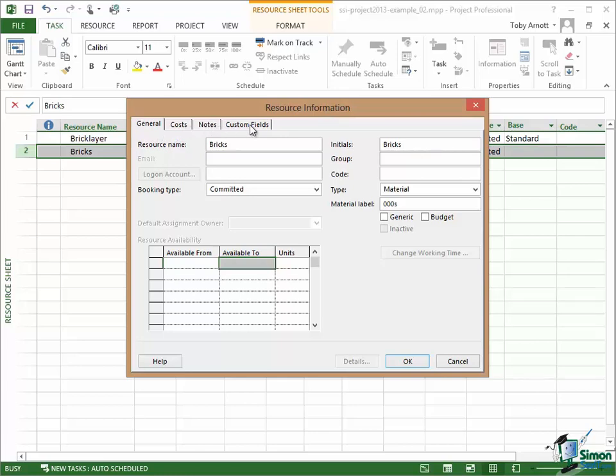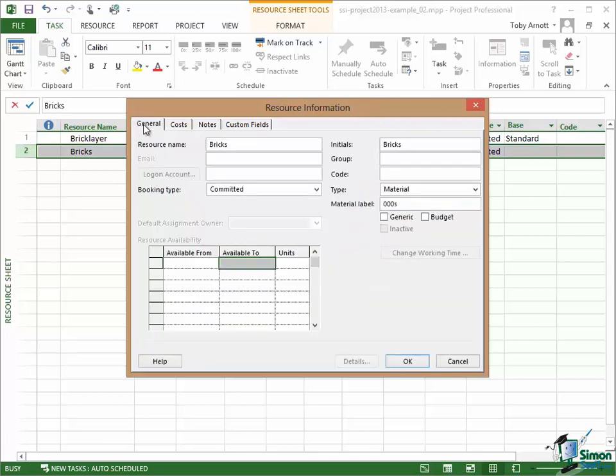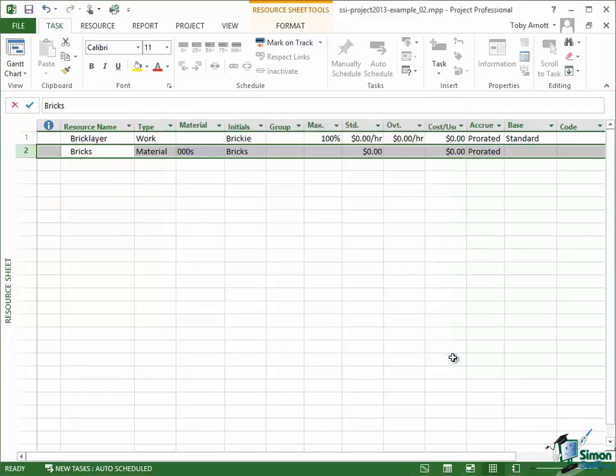We'll look at many of these later on in the course. One of the things to note here when you're dealing with say costs is that you can show rate changes over time. So if over a particular period of time the cost of something is going to go up or down or increase by a percentage, you can cover that within the Resource Information here. So when it comes to things like costing, Microsoft Project is pretty powerful in terms of what you can do. Now we'll come back to the Resource Information Dialogue in quite a bit more detail later on.